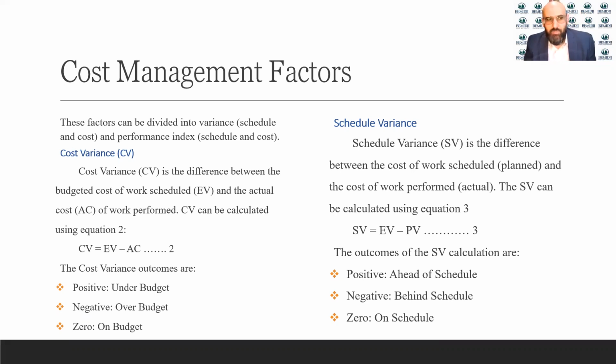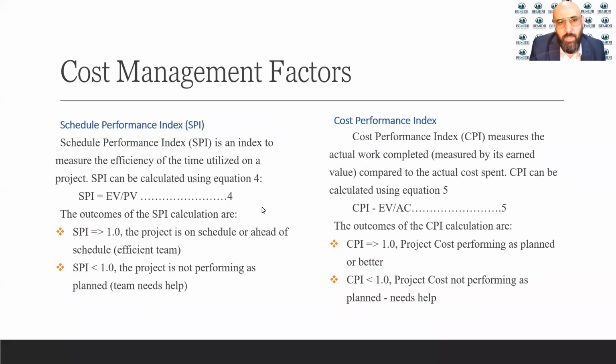And now, as a result for this calculation, we need to take a look into the outcome for this calculation. If it's positive, that means you are ahead of the schedule. If it's negative, that means your project is behind the schedule. If it's a 0, that means you are on schedule.